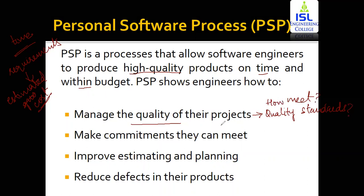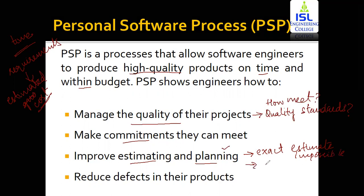PSP teaches making commitments that you can meet, and improving estimating and planning. When a particular individual is given a project in the first phase, he might not be able to make the exact estimate — exact estimation becomes impossible initially. So here you focus on how to improve estimation and how to make a plan. Planning means making a schedule, identifying different risks that might occur, identifying different resources required — including different technologies and the number of people needed — and identifying the different work tasks that will be performed.